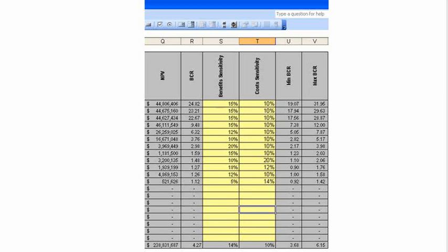So for example, if you've got a maximum for a project of maybe only 0.8, then it's not going to be economically viable. Or if you have another project where it's got a minimum of, let's say, 2.1, then that's almost definitely going to be economically viable. So it still has usefulness, even though we're not getting pinpoint results.